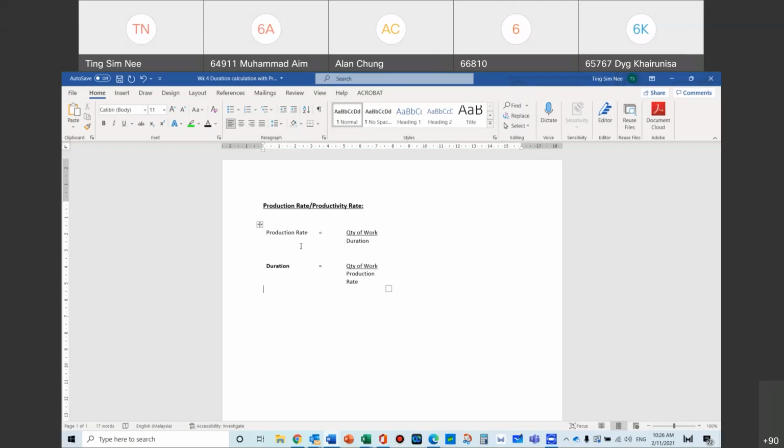So now what next? You said, okay, I know my duration. Then of course you need to know the sequencing of your activities. Some things must go first, something must come next, and all that. Some things can be parallel with one another because the activities are not disturbing one another. You have different sets of resources, so usually architectural work and structural work can be done at the same time. You don't have to do them one after another.